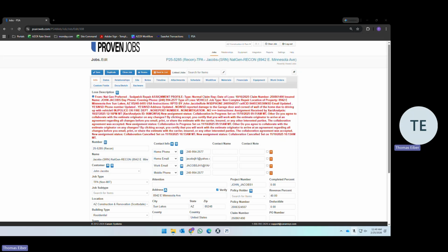You receive an update, you pass it off to operations so that operations can be the consolidated single point of updates going out to external entities from our company. Meaning, you get updates on 6 different jobs, you give it to ops. They are the one that is updating the external entities, clients, TPAs, etc.